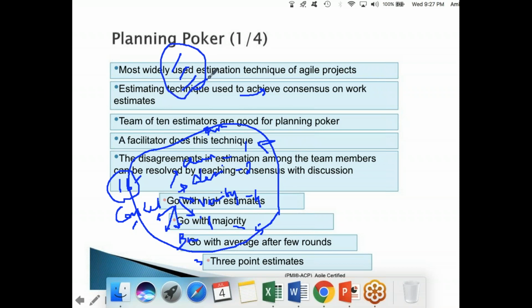All these three, all put together as a team. We have so many hours. We have 5 team members. 5 into 6, 30 hours per week. 6 means 8 hours, but there we have to discount the lunch time, right? We call it an idle time.